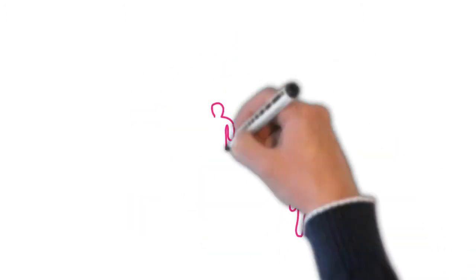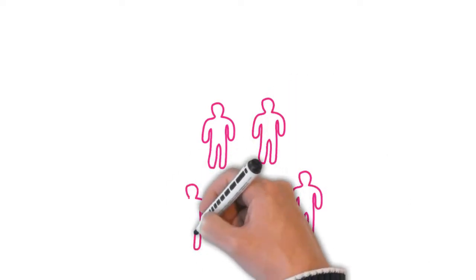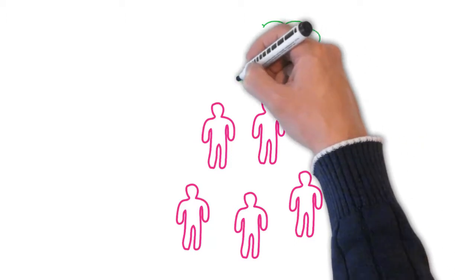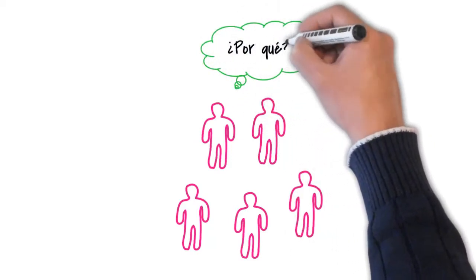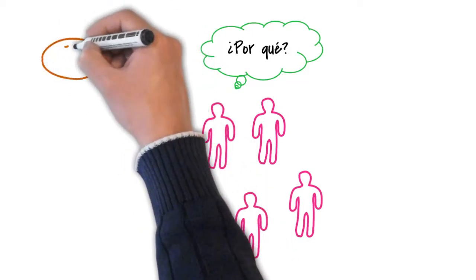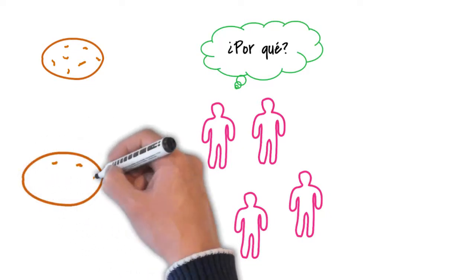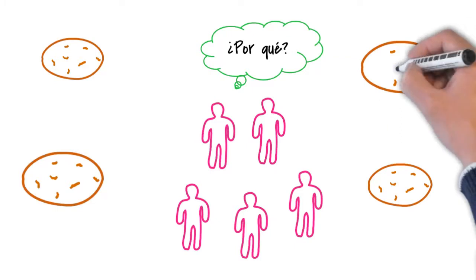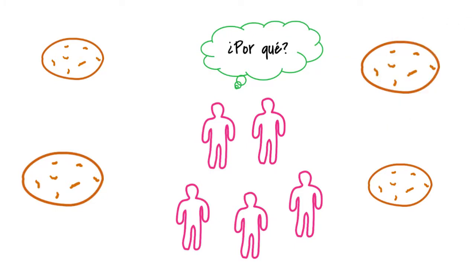Now, as this is the first sprint planning session, there are a few things you'll need to make sure happen even before you run it. Firstly, the team need to understand why the work is needed. What's its purpose, and why will it make a difference for customers or the organisation? They also need a backlog to work from. These are the big chunks of stuff that at this moment in time we think needs doing in order to achieve the purpose. Oh, and those brown things are supposed to be boulders, not potatoes or cookies. Those are the chunks anyway.